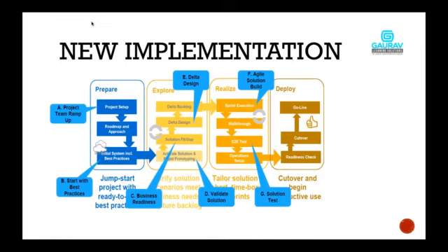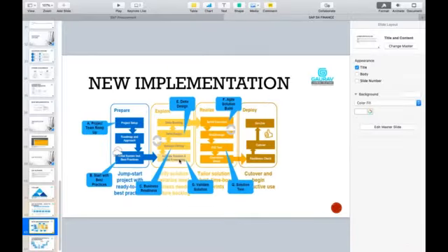One of our customers, we were explaining the EBS process, the electronic bank reconciliation process. The customer said yes, it is a very good functionality available in SAP, but we want to automate it. We want more level of automation, which is not possible in the standard system. So they said, okay, we want to add these things in our custom object. Looking at the requirement, first of all, we identified that particular feature as a gap. Then we understood what the customer wants, and we wrote that in the functional specification document.